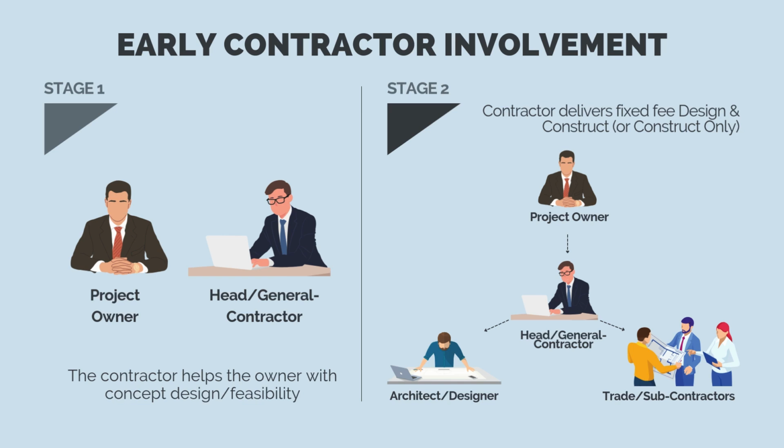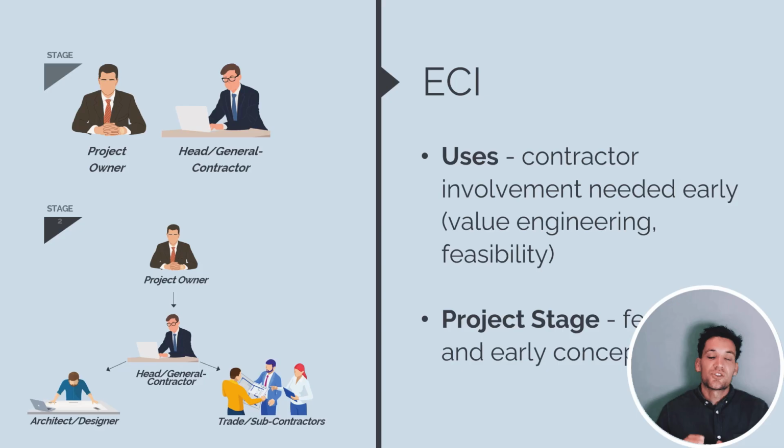So you can have a competitive ECI process where the contractors engage to develop the concept design, but then they have to tender the work competitively, or you could have a non-competitive process where you do the initial concept design with the input of the contractor, then they give a lump sum fixed fee to deliver the works as a design and construct model. So you see this model a lot in the renewable energy industry where you have a